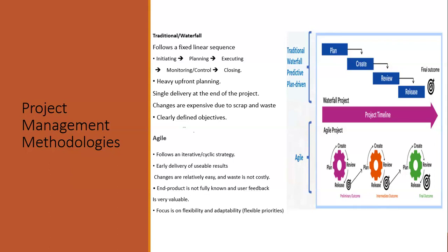A few pieces of information gathered from the stakeholder or the owner of the project. So let's assume now we are using Agile to build a house. Of course, I'm not saying it's actually possible, but let's say we are using it to build a house. I don't need to get the whole information about that house, how it's going to look, the color of the paint and everything. No, I just need to know maybe is it a bungalow, or is it a duplex, stuff like that. Then I will continue with my team. So along the line, we continue interacting with stakeholders, and we're getting more information about the project as we progress inside the project.